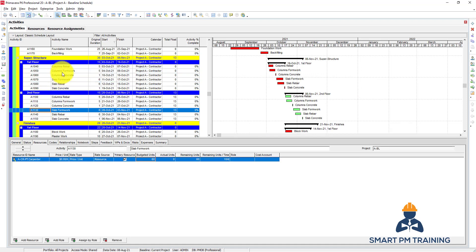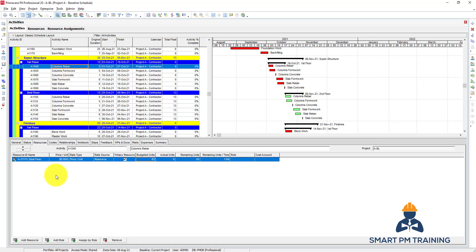For the column rebar, I have the steel fixer assigned here. The resource ID, name, steel fixer, price per unit - I cannot change it because it should have been previously identified in the resource creation.